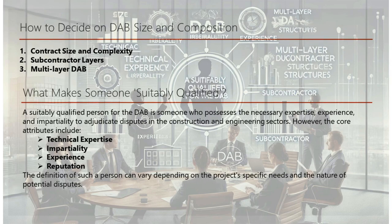For projects with numerous layers — such as consultant agreements, supplier agreements, and subcontract agreements — a multilayer DAB might be beneficial despite procedural and administrative challenges. This setup can improve dispute resolution across the various layers of a complex project.